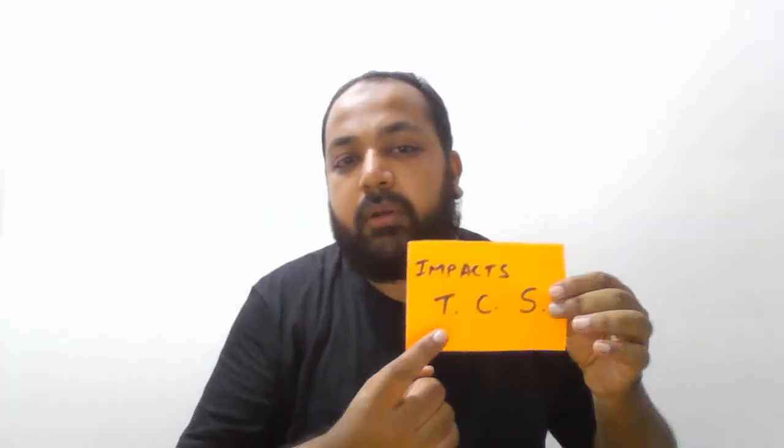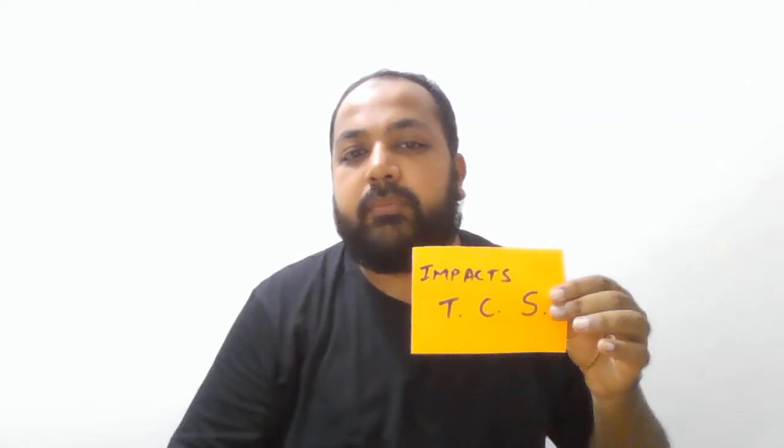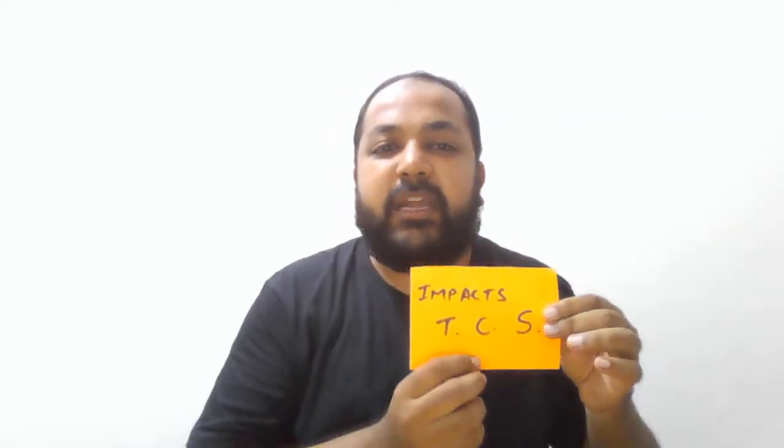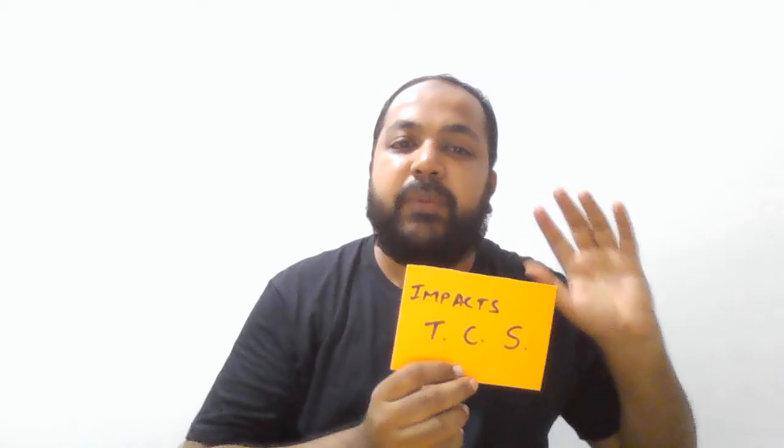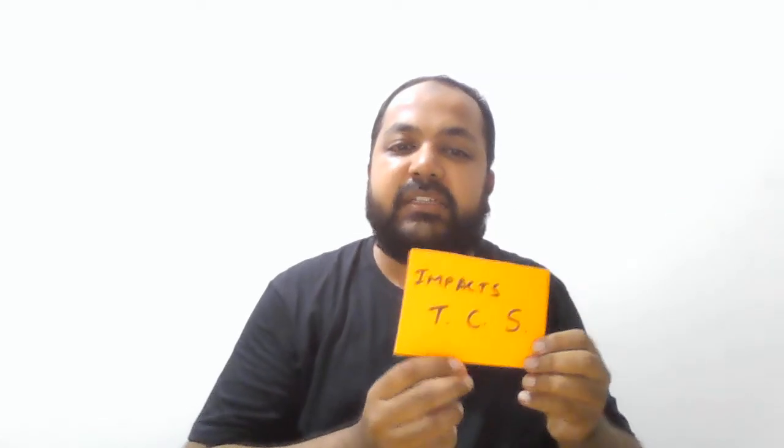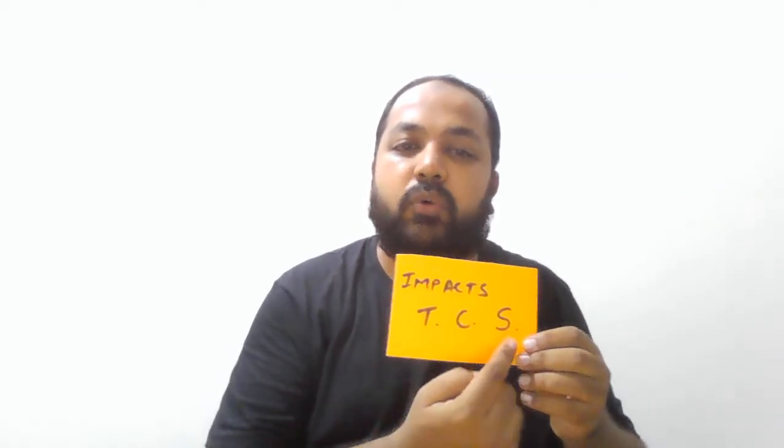Now, an 11th feature, a new feature, is coming. As a project manager, I cannot make that change because it's not formally approved. Because this new change has an impact on time, cost, and scope. Change management is about assessing the impact of any change on time, cost, and scope. A configuration item that has got new additions will go through a change management process.